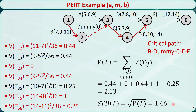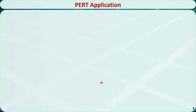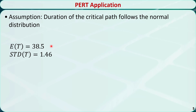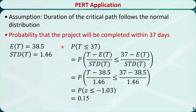The standard deviation is the square root of the variance, which is equal to 1.46. After we get the expected duration and the standard deviation for the critical path, we can find the probability that the project will be finished within a certain number of days. Assume the duration of the critical path follows the normal distribution with a mean of 38.5 days and standard deviation of 1.46. The probability that the project will be completed within 37 days can be calculated by converting to a standard normal distribution with mean 0 and standard deviation 1. You can look up the normal distribution table, or use online tools or a programming language to find the probability. It is 0.15, meaning the chance of finishing the project within 37 days is 15%.